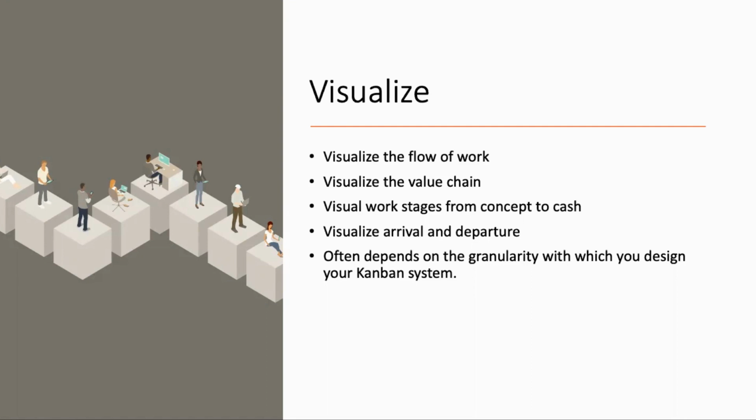For example, in a software development life cycle, we'll say that there is ideas, then we'll do the market research, then we will do the discovery, we'll come out with a prioritized list or the prioritized backlog, and then we'll move it to development. Within development also there could be various stages.